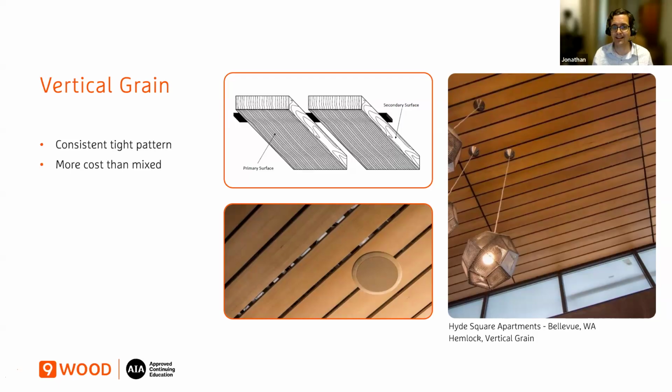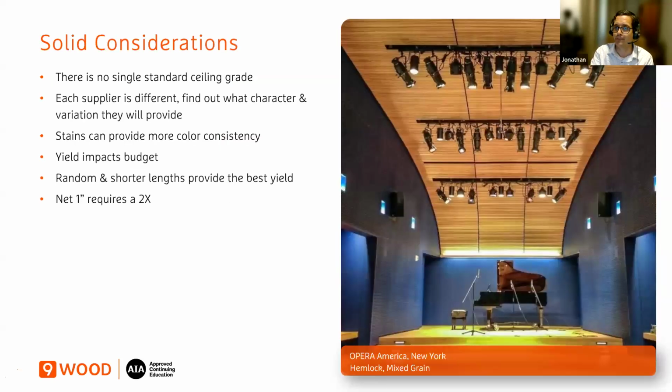The key idea is, if you're entertaining maybe one or the other and don't know, get samples early on and get the real-time budget info you need for that particular species, and actually for the profile size too, which can affect cost. So you know what you're getting into before you get too far down the road and specify a product. We're dealing with a natural material, and it's a custom wood ceiling, so there are some things to consider, some potential gotchas.